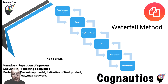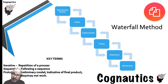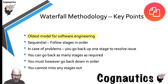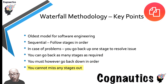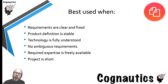It's important to remember that this methodology was the original methodology, and although it's set in stone here, life isn't always like that — there are some products and teams for whom this wouldn't work at all. To recap: it's the oldest method, it's sequential, you flow through the steps in order, any problems you go back up one step or as many as you like, but you can only go back down one step at a time and you can't miss any stages out.